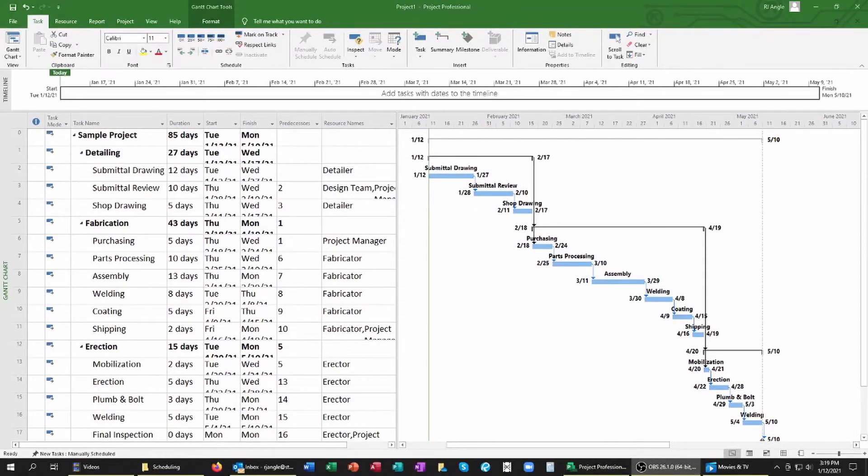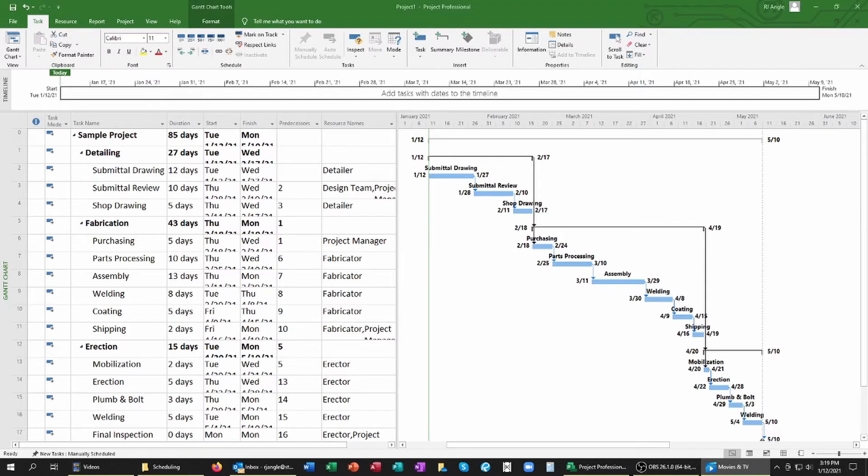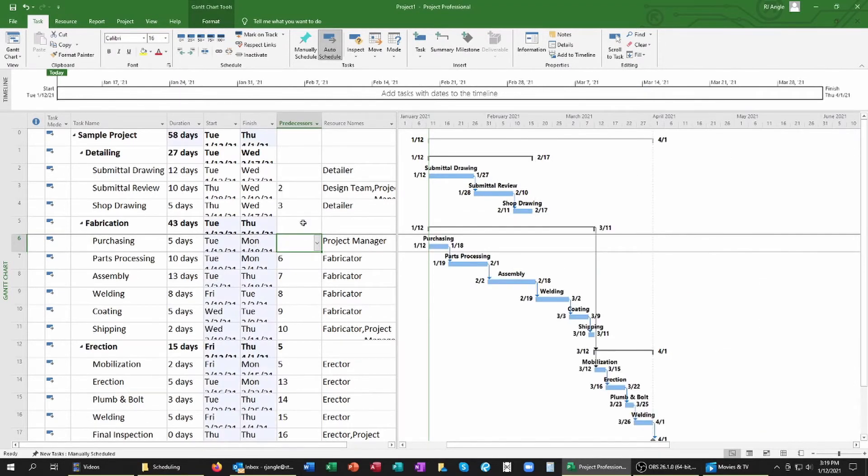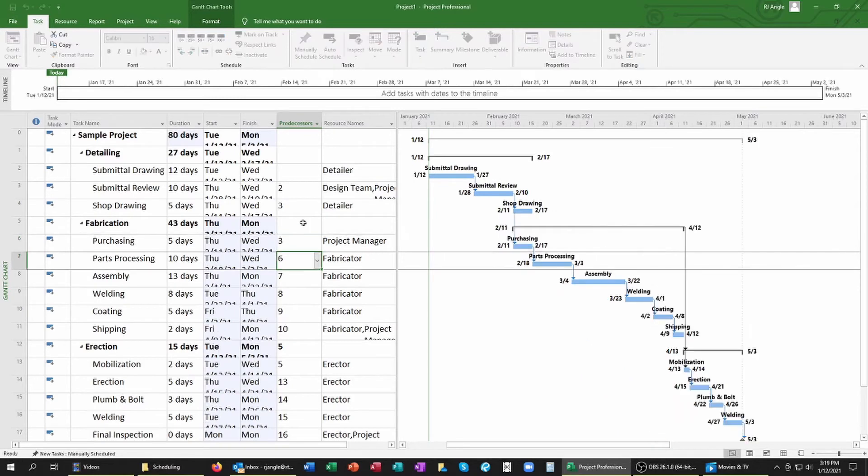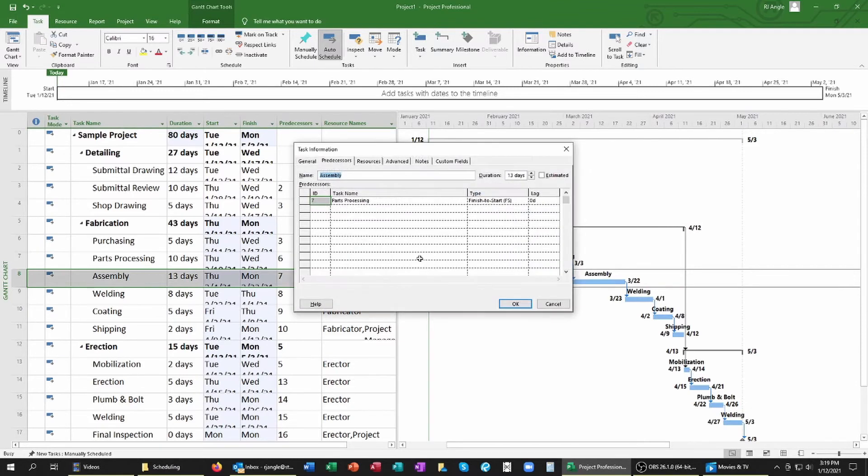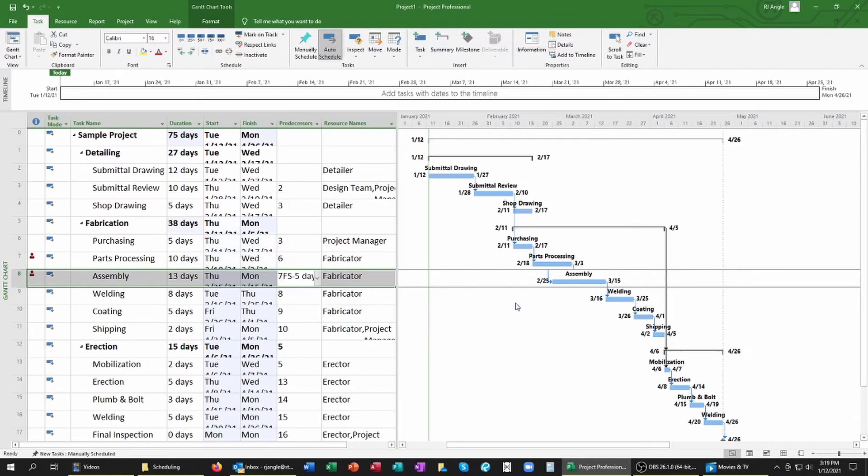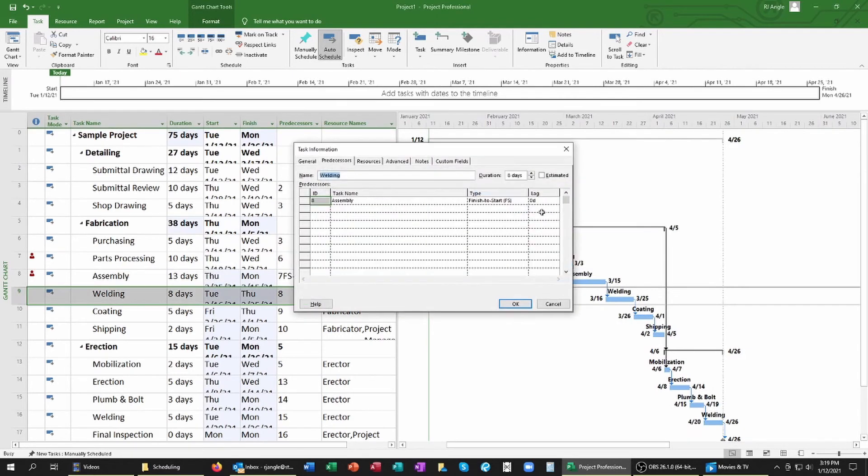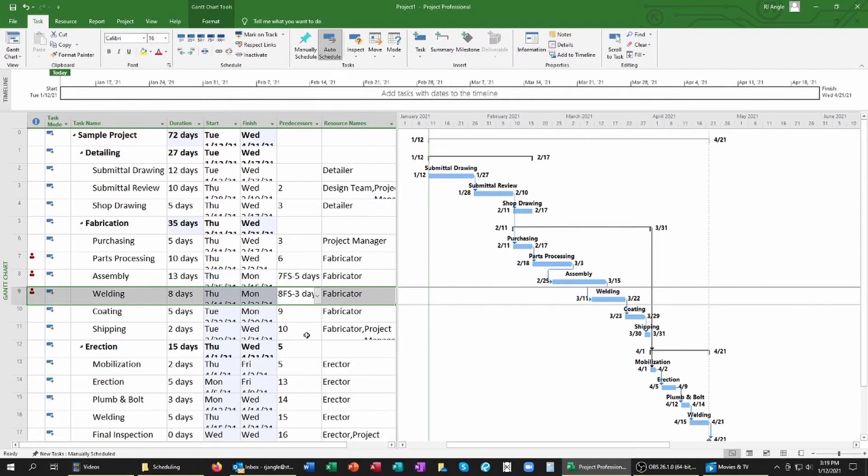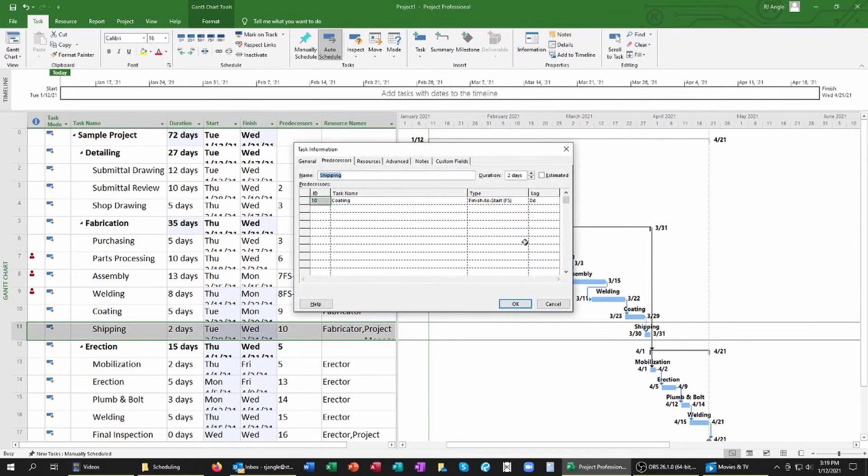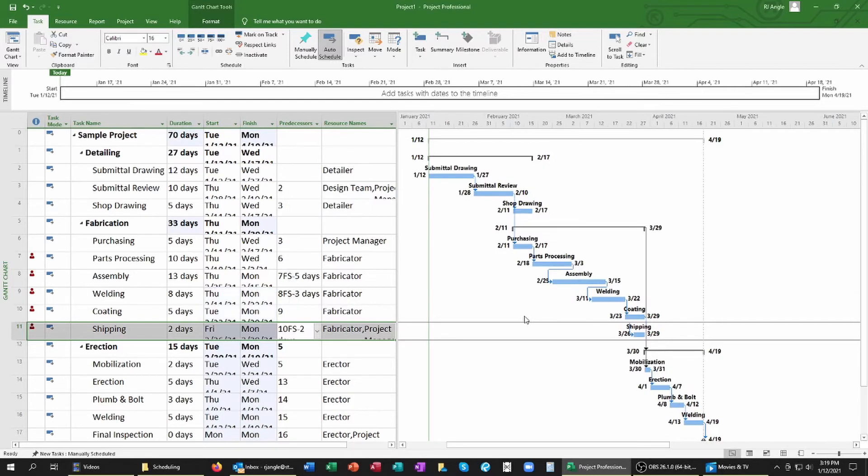Your second option is overlapping tasks. If any one or portion of these can be done concurrently, you need to take a look at how you can compress these. Take, for example, you may not have all of the shop drawings you need from your detailer, but it doesn't mean that you can't start fabricating from the drawings you do have in hand. Similarly, you may not have all of the steel fabricated and out of your shop, but it doesn't mean that you can't start delivering and erecting the steel that you do have done. Doing this shows effort and cooperation with the general contractor and your thinking outside the box.